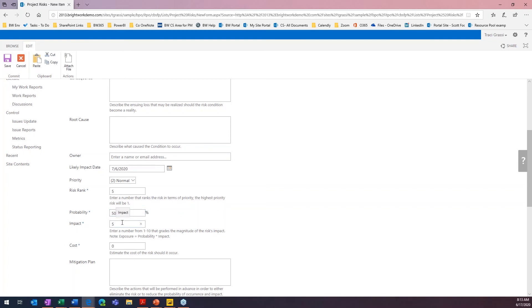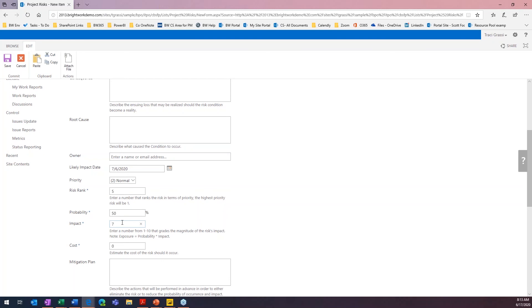So, this is kind of your gut feel on, is this going to happen? Is this not going to happen? And if it does happen, based on a scale from 1 to 10, 1 being low, 10 being high, what is the impact to our project if this does happen? So, we have a 50% chance of it happening. But if it does, what is that impact going to be? And let's say this is going to be a high one. This is going to be a seven because we're going to lose someone within our project, and it's going to change our schedule.